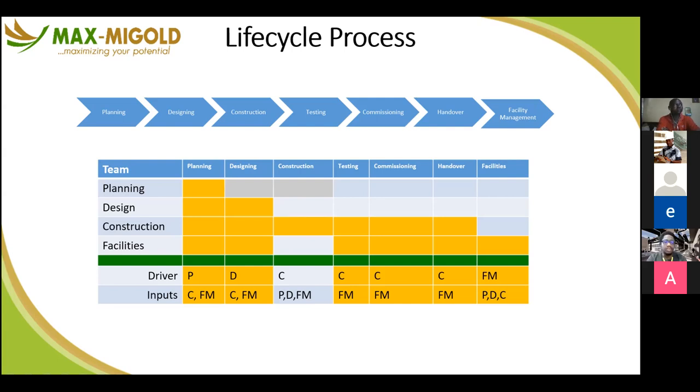At the construction stage, things will go wrong, things will change. The FM's primary objective at this stage is to document change so that when the facility is being handed over to you later, you have a history of all changes that are taking place. Change and variation management. So that someone does not go through a shortcut to deliver your project to you.